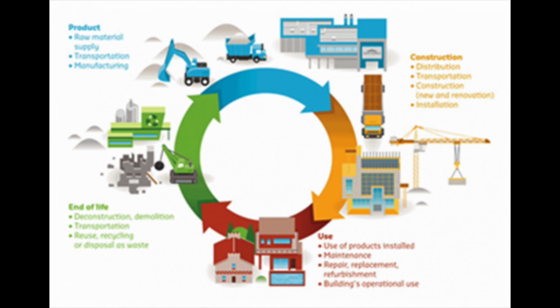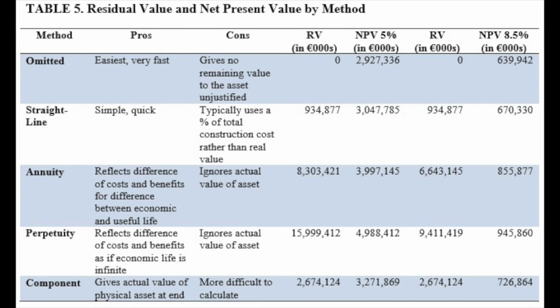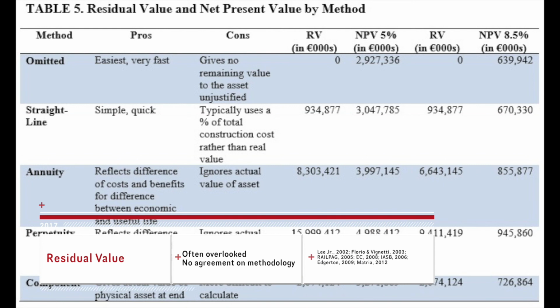It should also be noted that life cycle analysis is not performed with cost-benefit analysis, so the advantages of a lower capex are included, but the possible higher operations and maintenance costs are not, thus biasing low front-end capex projects. Residual value. Often overlooked, no agreement on methodology.